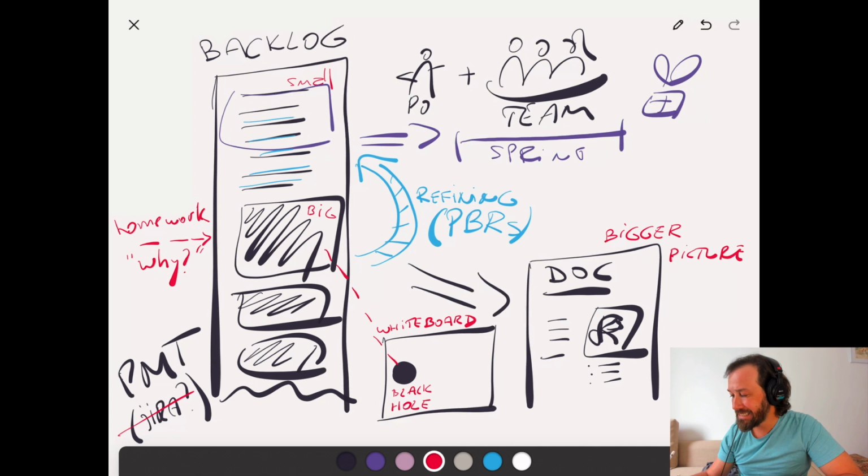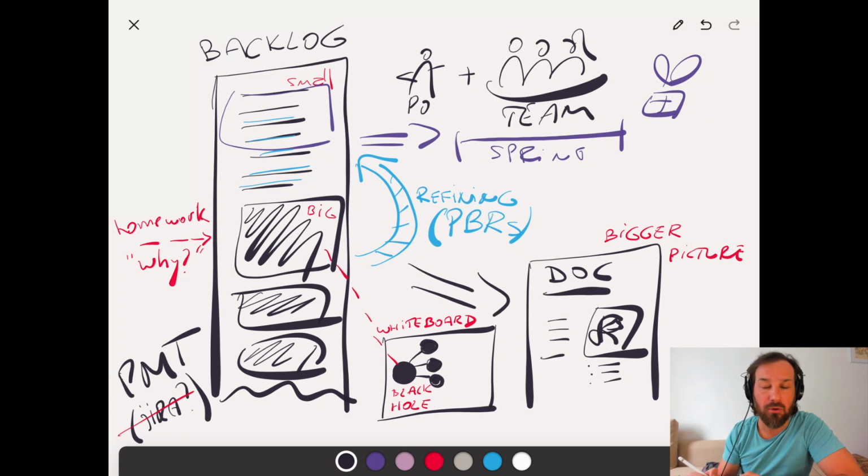So let's say this whole thing is a payment capability of your website, and this black hole here represents this payment capability. It's too big, right? It needs to be broken down. It needs to be refined and clarified. So what you do, you break out some small items from it. They're still black holes and black boxes because you still don't know what's inside, but you can say, well, this is a MasterCard, this is a Visa card, this is PayPal, okay? And now, after a discussion, you have realized, okay, let's focus on MasterCard because we are based on the market where this card is the most important one, for instance, to start with.